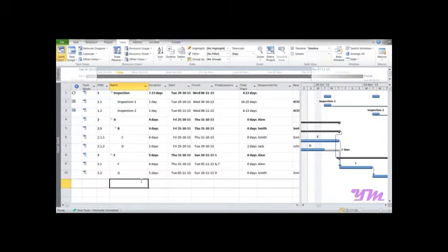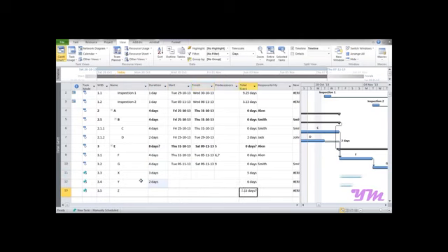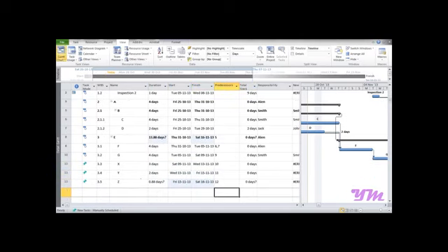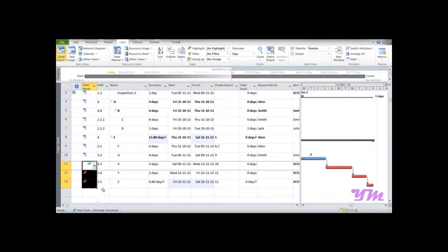Now let's try out how it works. Let's say we are adding three activities, X, Y and Z, having durations of 4, 3 and 2 days respectively, and having predecessors as 10, 11 and 12. Now you can see on the screen that these activities are appearing over here, but they are shown with pins as they are manually scheduled. If it were an auto schedule, it would have been displayed in this manner.